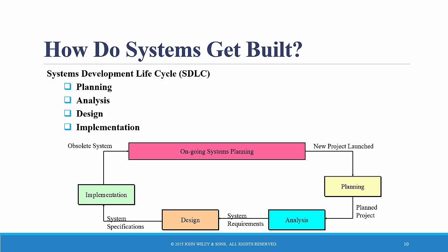Let's just say a couple of things about terminology. We call planning, analysis, design, and implementation phases. Each phase can be broken down into a series of steps, and each step relies on techniques that produce specific deliverables. And in many implementations of the SDLC, you need to proceed from planning to analysis to design to implementation, because the deliverables of each phase are necessary to begin the following phase.